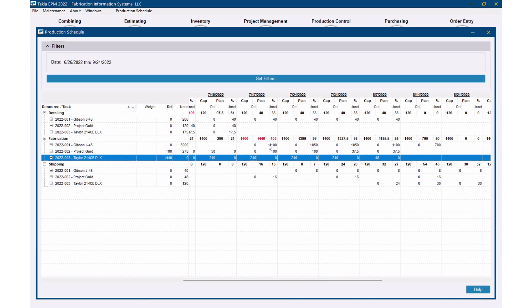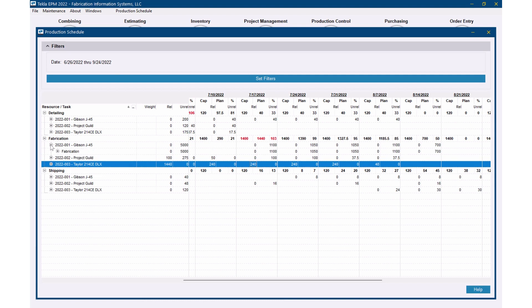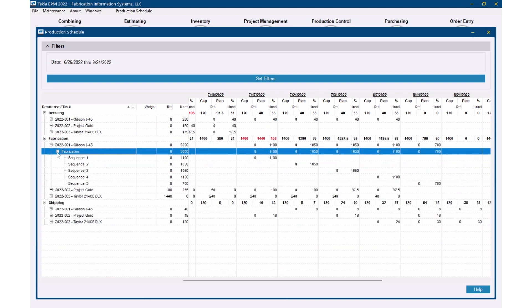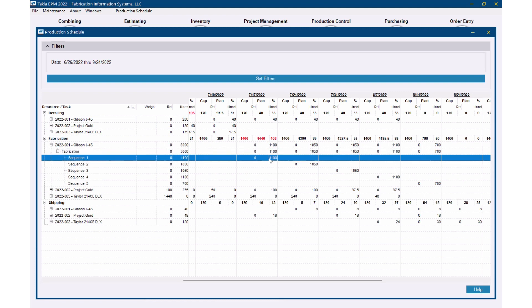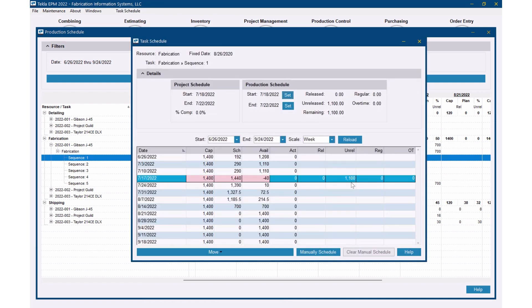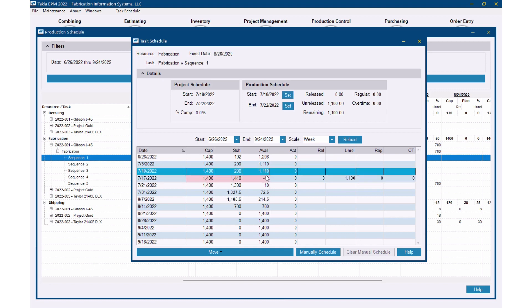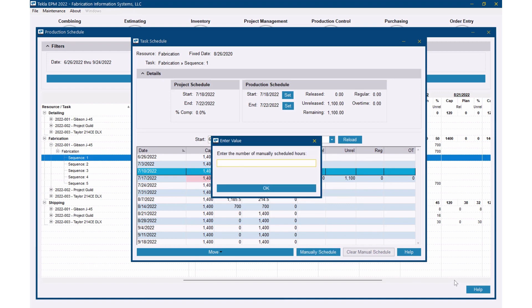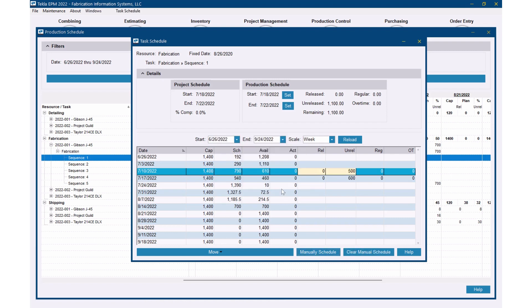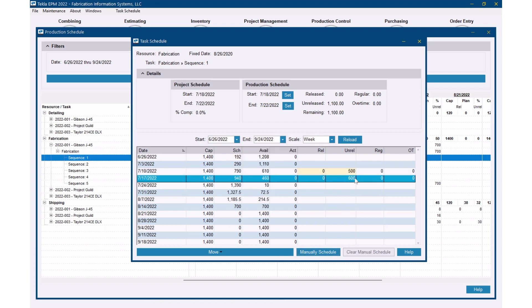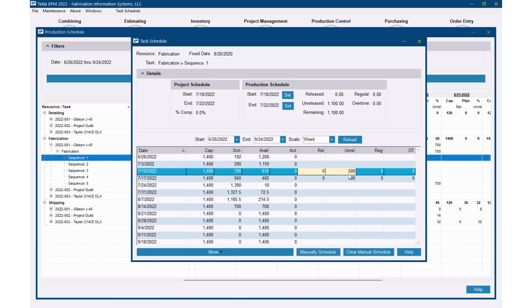So what I want to do, I want to open this up a little bit and go down to this. And it's my sequence one that is the culprit here. If I think I can pull this up and maybe do the detail earlier, we'll double click on that field there. And that shows me right here, this one week I'm over capacity, but the week before I've got plenty of capacity. So why don't I pull some of that up? So since I've got that week selected, we'll manually schedule that. And let's say I'm going to try to pull up 500 hours into that week and I'm going to say okay. So now instead of 1100 hours in this week, I've got 500 here, 600 here. So just by putting 500 there, it reduced these hours to what the difference was there.